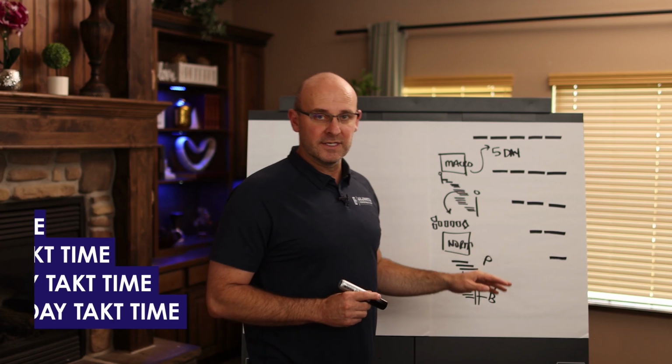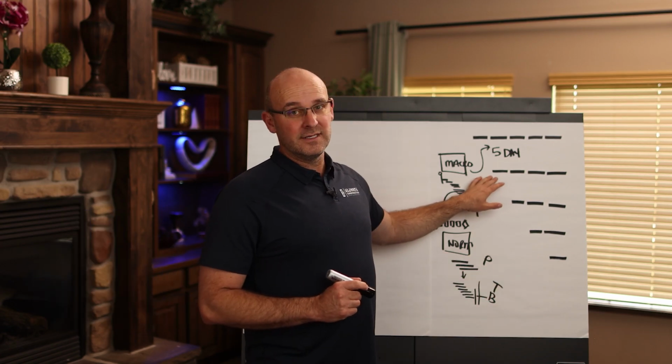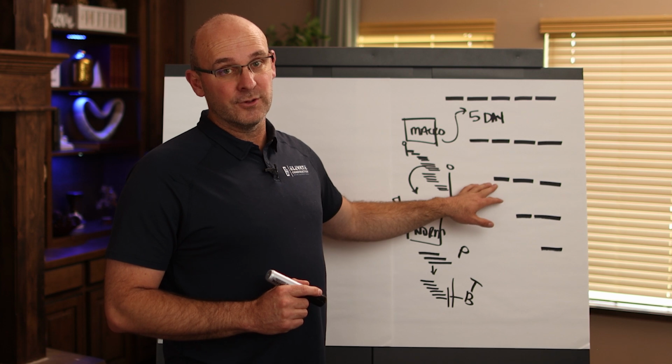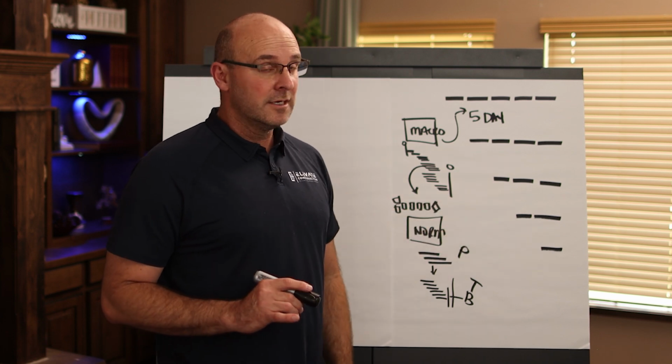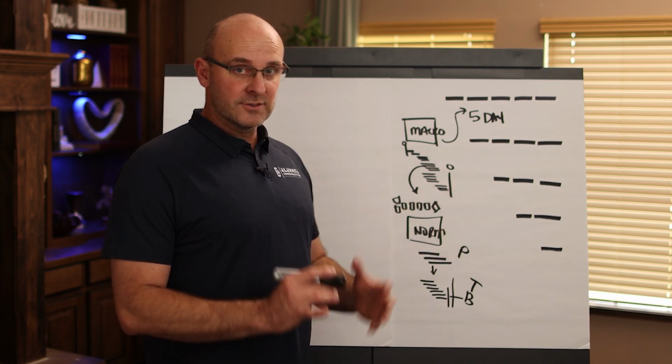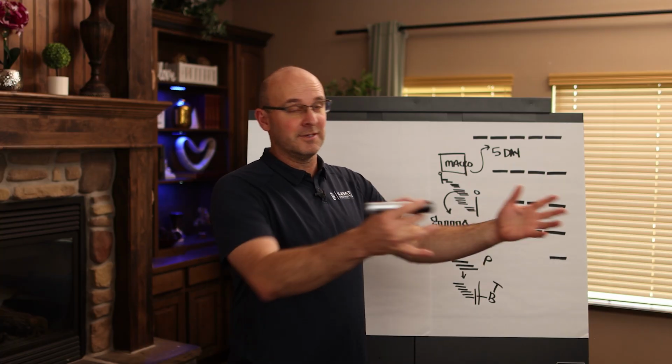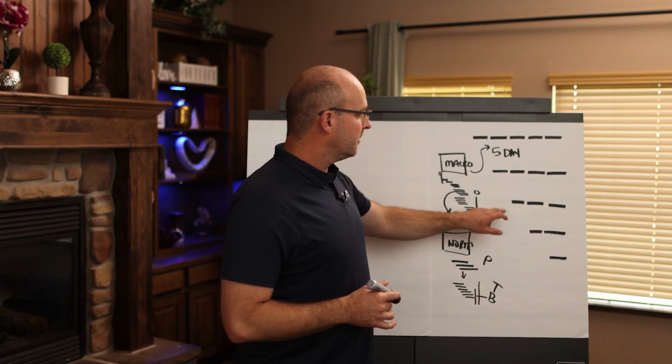I want to start out by explaining that this is pretty easy to do in North America and in Europe. And a 3-day takt time is very doable. It starts to get a skosh bit like, that's aggressive. You've got smaller zone sizes. Every 3 days you're clapping, drum beating or takt timing people into new zones. This is probably where we are.